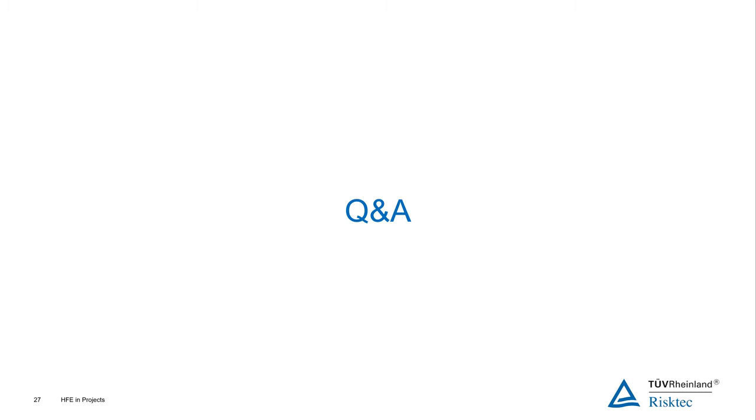Yes. So really you have a HAZOP 1 and a HAZOP 2, don't you? HAZOP 2 being in more detail. And I think sometimes a HAZOP 1 is a high level HAZOP. Usually I don't think the human factors input is always that necessary, and you can use human factors guidewords sometimes in that. But if you get into the more detailed HAZOPs, depending on what you're looking at, then it can be useful to have a human factors specialist in. But I don't think a human factors specialist necessarily would need to be a core member. I think it is dependent on the project and dependent on what you're looking at.